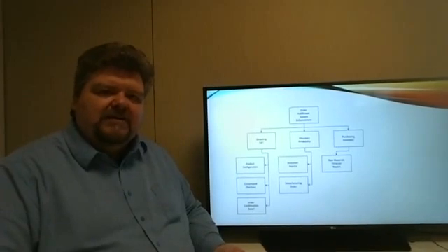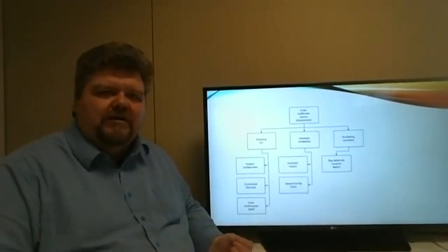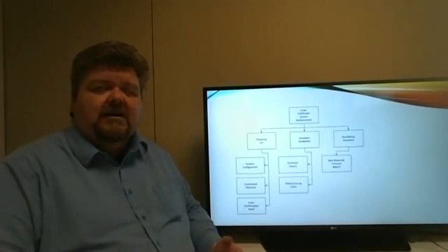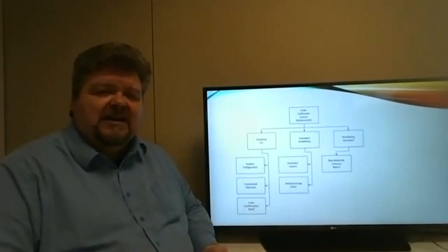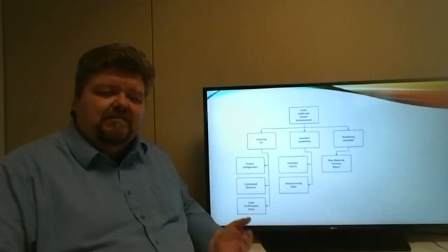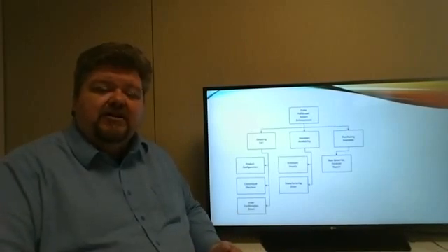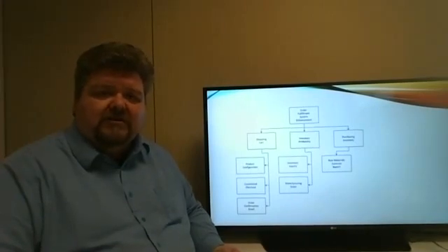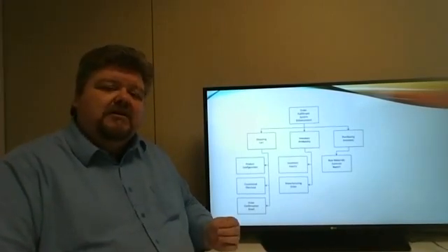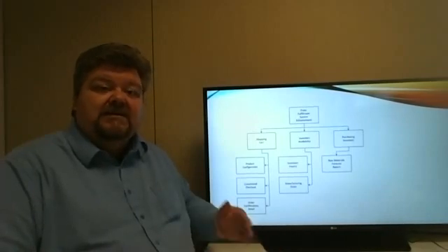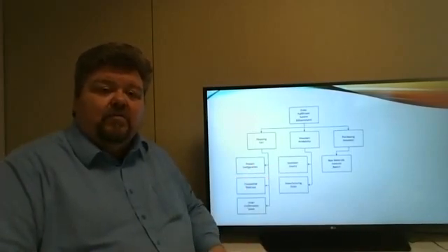On a work basis, you would take a particular piece of work that must be performed, such as your change initiative or your project, and break that down to its highest level components. Then break each component down to a lower level component. This is a very good start for a work breakdown structure, as it is much easier to accurately estimate those lower level work buckets than it is that very high level work bucket.